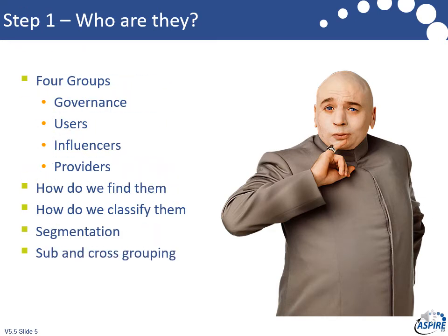Users of the system or whatever it is we're creating, people who are going to be affected by it in their daily lives. And then the influencers, the people around the outside. Maybe they're subject matter experts. Maybe they're YouTubers, whatever it is that they do. How do they influence us and how do we influence them? Press being a big one if you're in certain industries. And then there's providers, the supply chain, the people that, if you're making changes, may change their contracts. We need to engage them. So that's your starting point, the GUPPI headings.